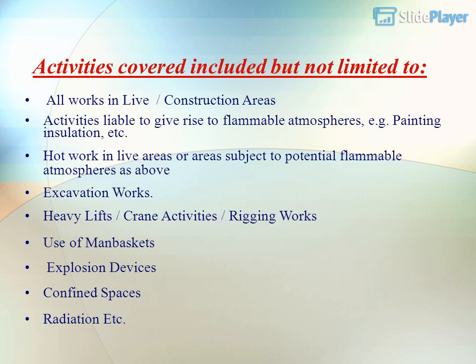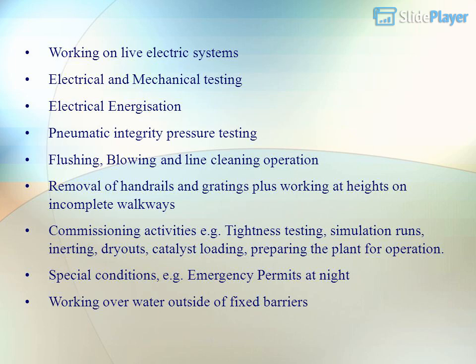Activities covered included but not limited to: all works in live construction areas. Activities liable to give rise to flammable atmospheres, for example painting, insulation, etc. Hot work in live areas or areas subject to potential flammable atmospheres as above. Excavation works. Heavy lifts, crane activities, rigging works. Use of man baskets. Explosion devices. Confined spaces. Radiation, etc. Working on live electric systems.